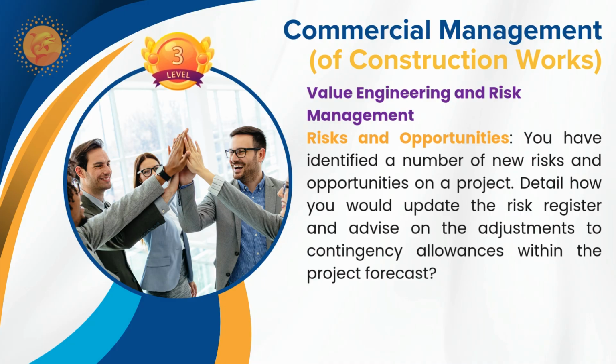Maybe with your experience, some of the elements may not have been included by the tendering department, or you may have identified some opportunity for cost saving. Maybe the tendering department considered your in-house labor, but a subcontractor is much cheaper for you than the in-house labor. In that case, of course, you can propose the subcontracting.